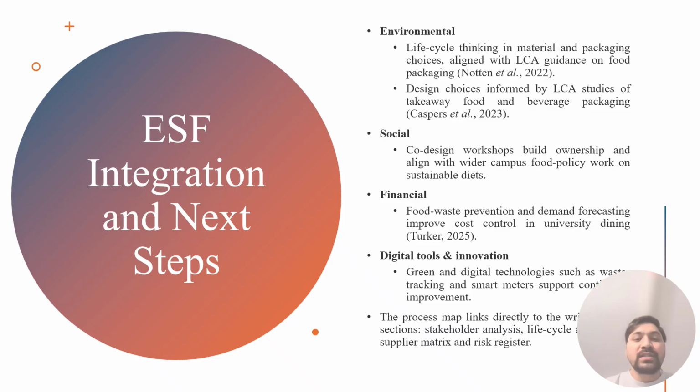The financial dimension is integrated through the cost and sales baseline, the business case, and the budget and funding tasks. The project plan explicitly considers capital cost for new equipment, potential change in labor requirements, and projected impact on sales and waste disposal cost. The risk register includes financial risks such as lower than expected uptake for refill options or delays in securing funding. This allows the team members to consider mitigation actions early, such as phased implementation and targeted marketing.